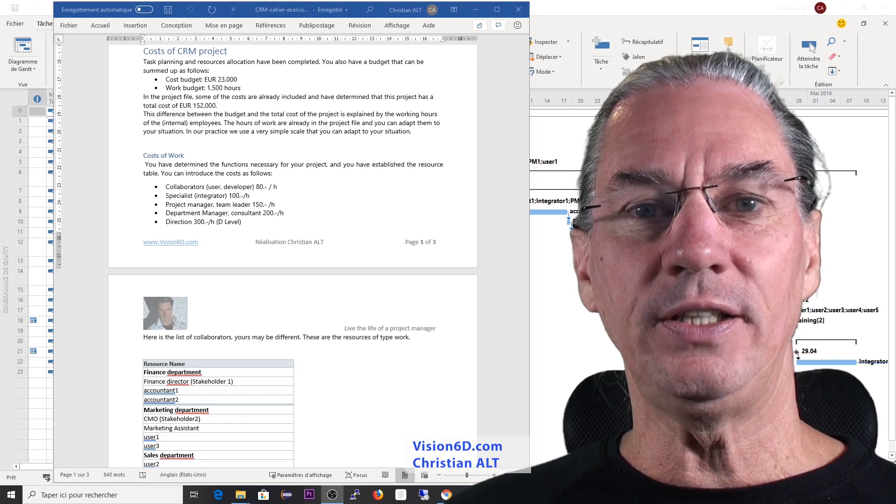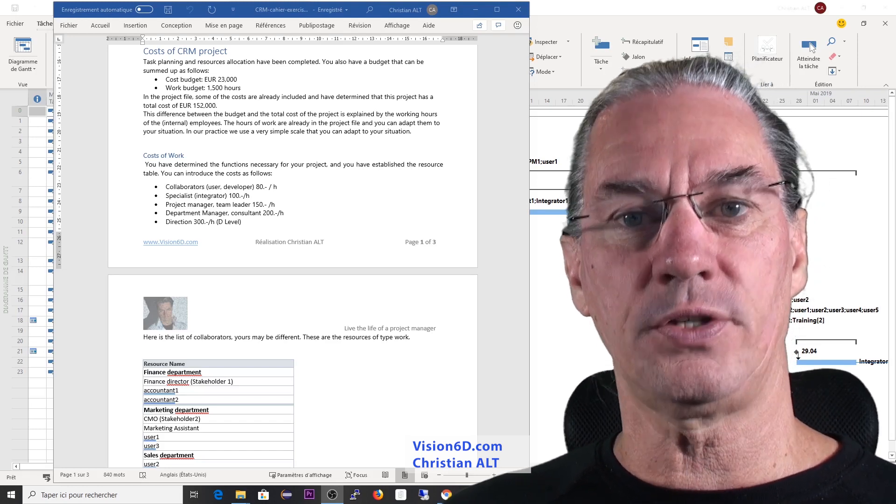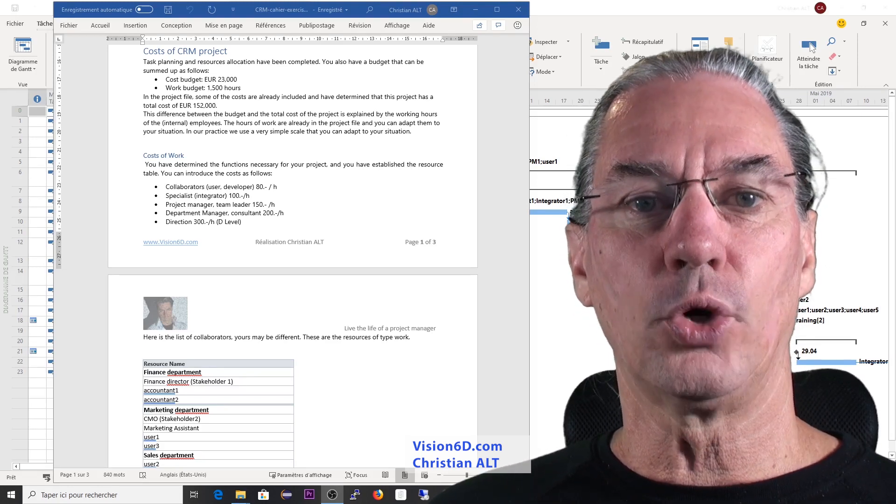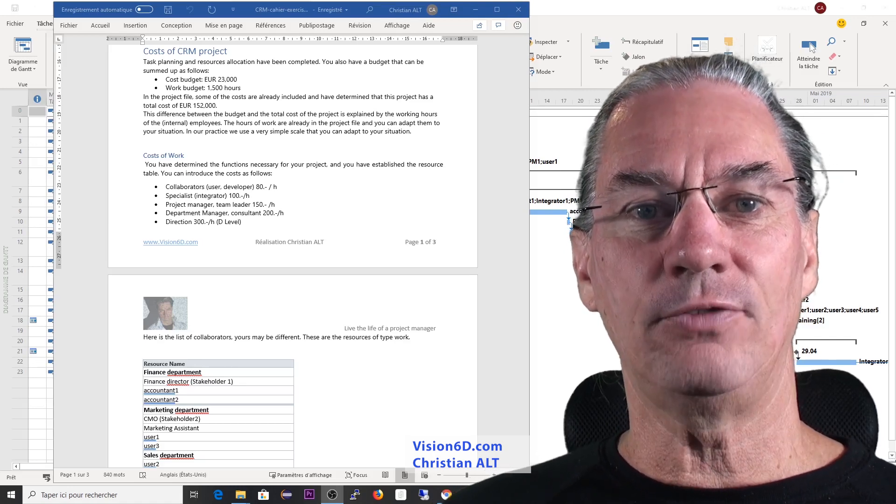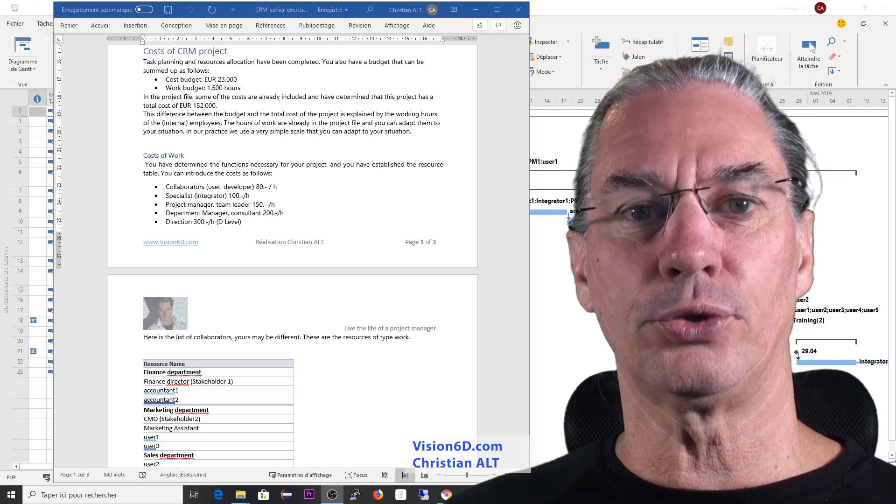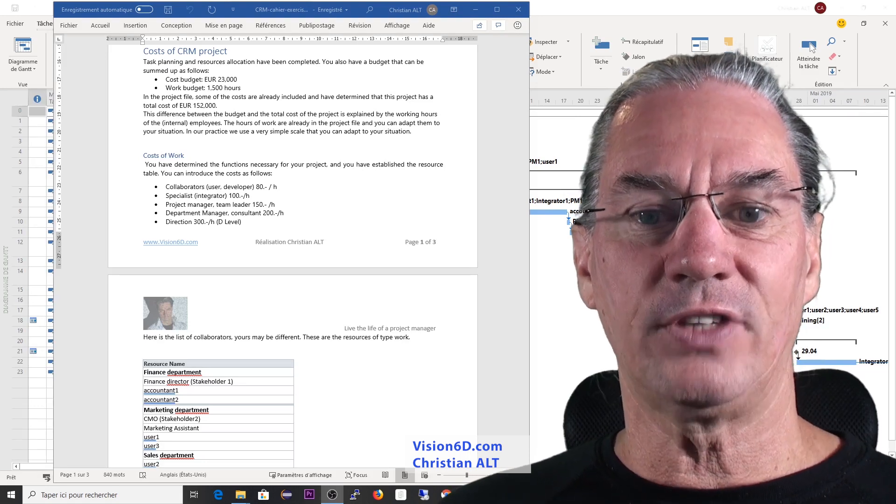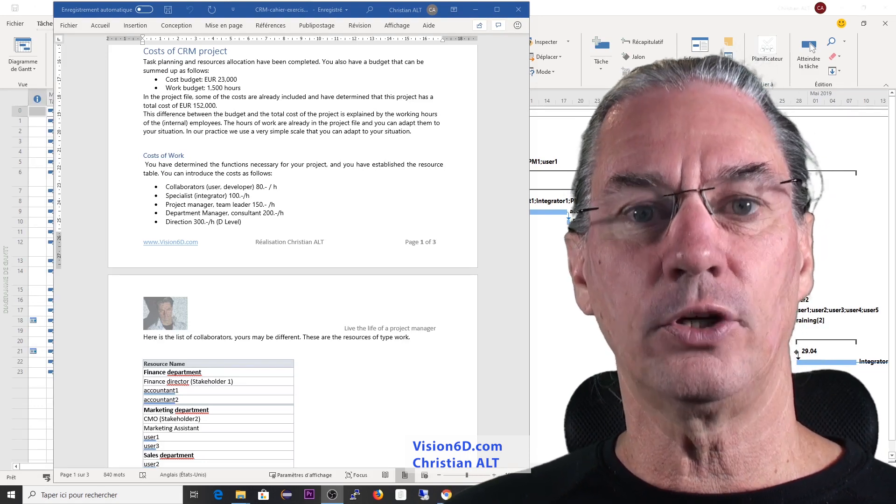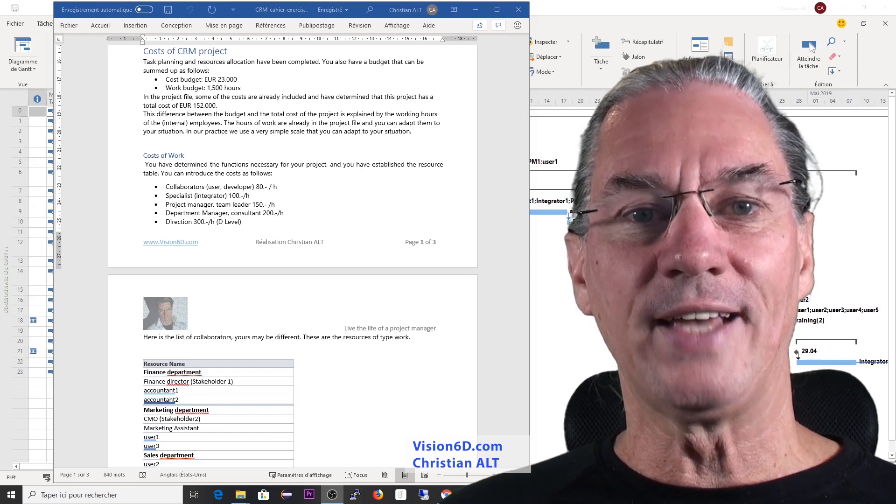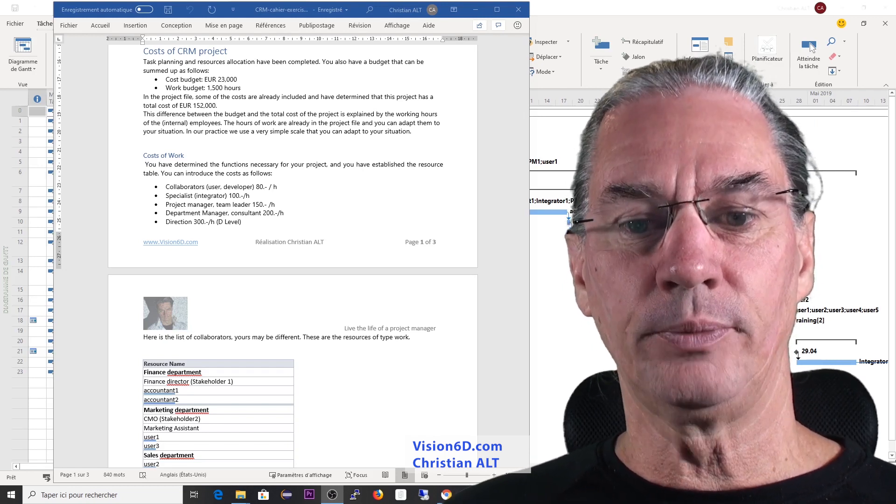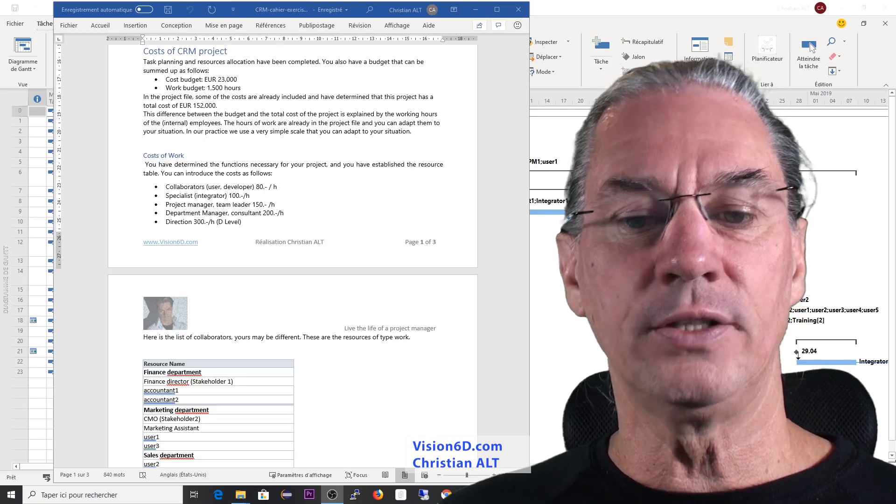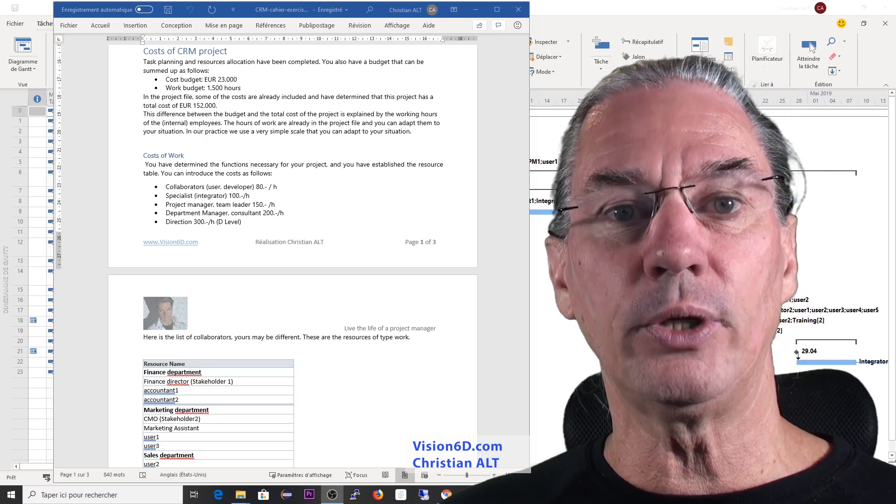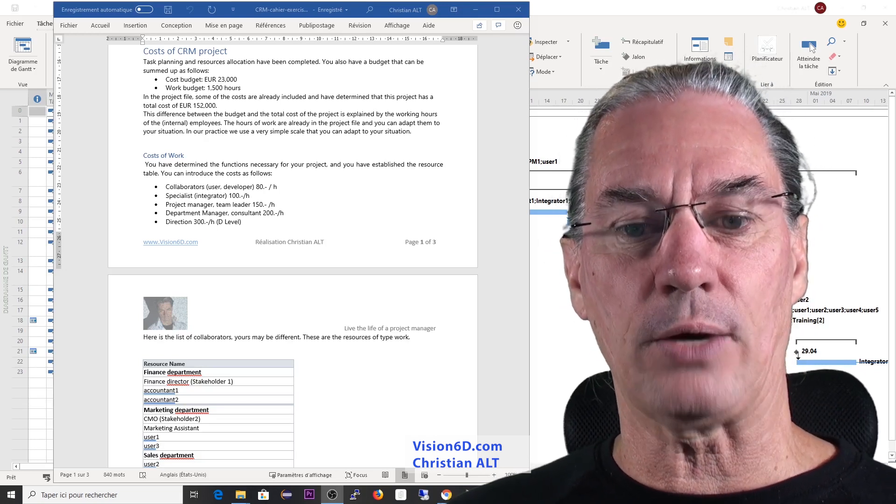Now, you will need to calculate the real costs of the work for each task. For this, I gave you a list of the co-worker rates that I set at five different levels. You have co-workers with 80 euros per hour. You have what we call specialists that are integrators, for example. They will cost 100 euros per hour.